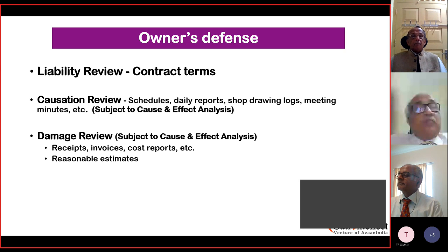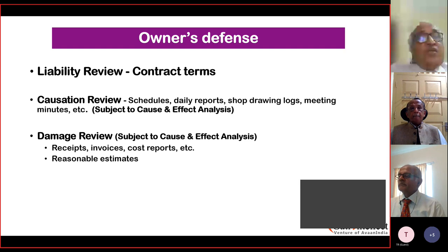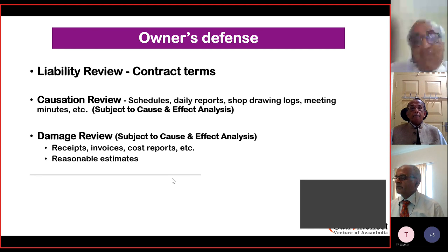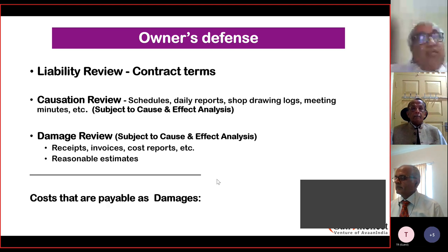Yes, Ram. So here, I think we have gone through the cause and effect analysis. Suppose the owner has to put up a claim, they review the liability, they subject it to the cause and effect analysis, they review the damage, find out the cause of the damage, receipts, invoices, and ultimately raise the claim. So the costs that are,